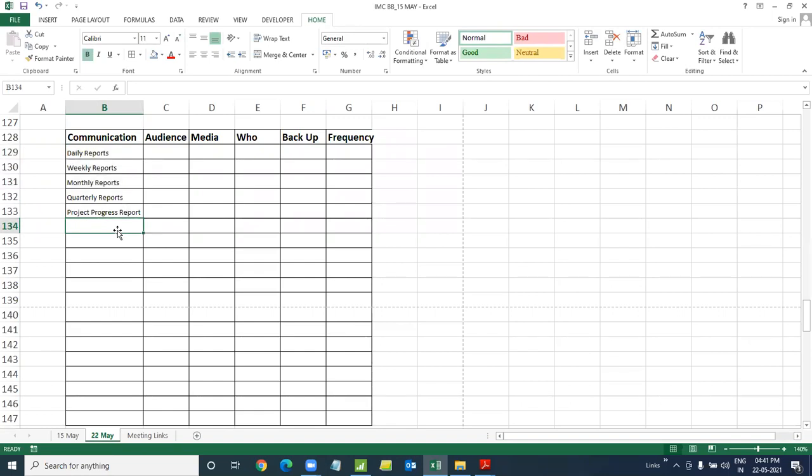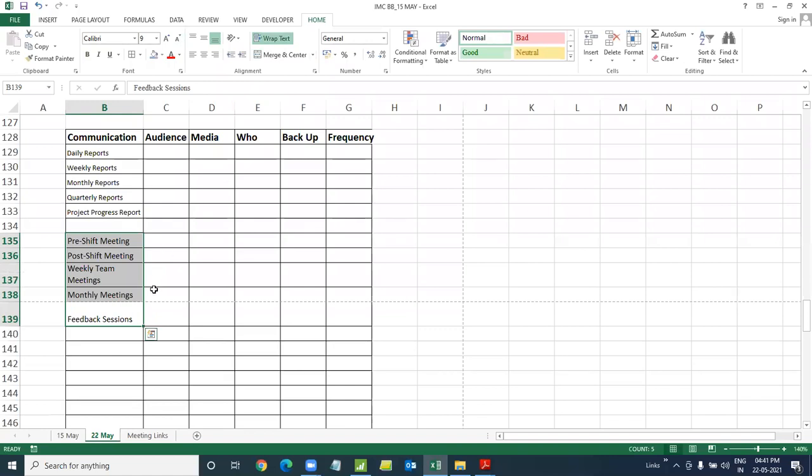Say we're done with the reports part of it. What all communications will be required? Probably some meetings will be required. So daily meetings, say pre-shift meetings before the shift starts, post-shift meetings after the shift, probably some weekly team meetings. I would require, say, monthly meetings. I need feedback sessions, some sort of meetings which will be required during the entire project. We would definitely need to plan for those communications. There will be communication required for all these at some point in time. Yes, we would require them.